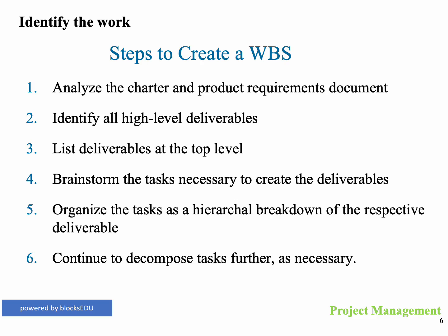We then brainstorm the tasks necessary to create the deliverables. We usually do this by using post-it notes or sticky notes and just asking people to say what work needs to be done and put it up on a wall. We organize the tasks as a hierarchical breakdown of the respective deliverables, and we continue to break those tasks down as far as necessary, as mentioned earlier, to a point where we can actually assign that task and hold somebody accountable. Those are the steps to create a work breakdown structure.